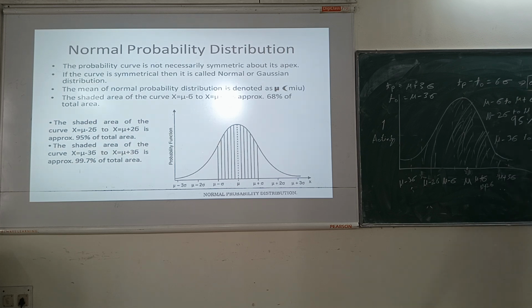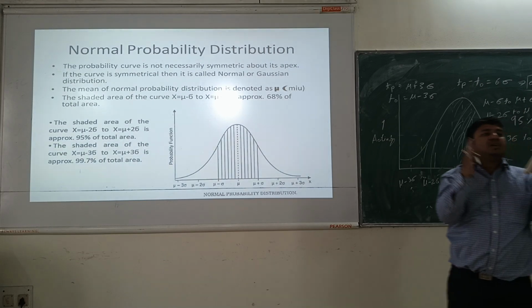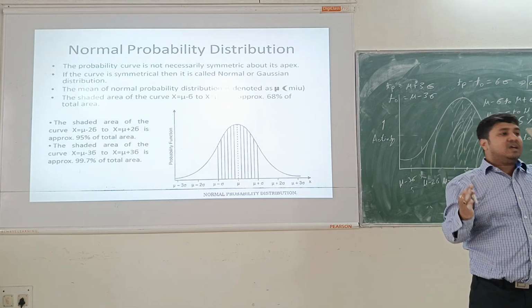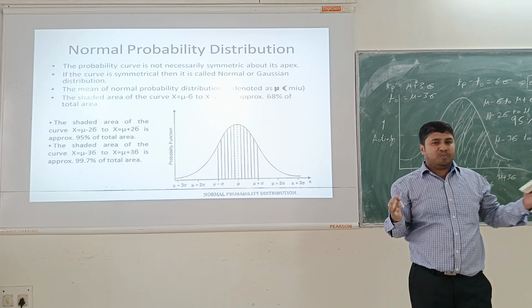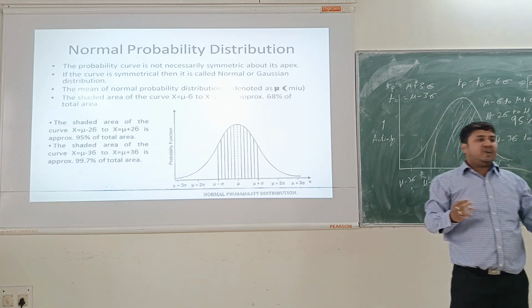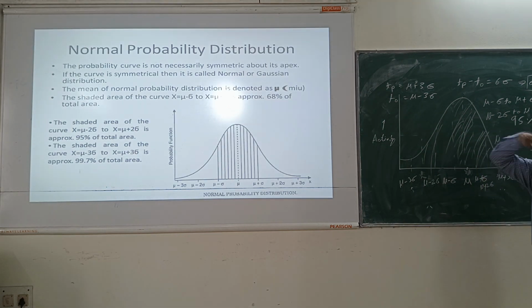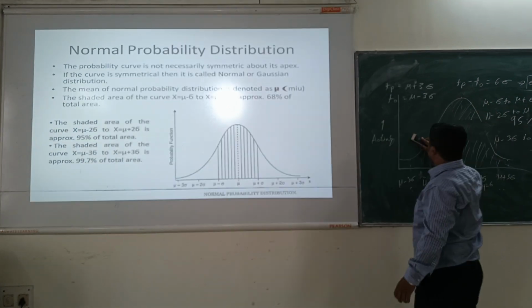Okay, so this is how we can get the standard deviation from the optimistic time as well as the pessimistic time, without needing the most likely time. With the range of the most optimistic time where the activity could finish earliest, and the worst condition which will take the maximum time to complete, the average gives the standard deviation. Okay, and variance is what? Variance is the square of the standard deviation. Okay, all of you got this point?